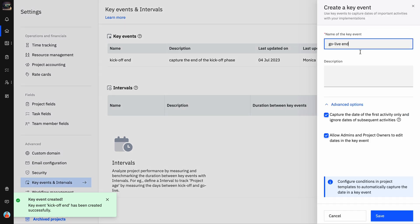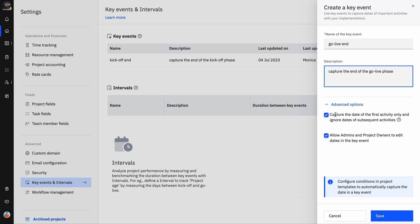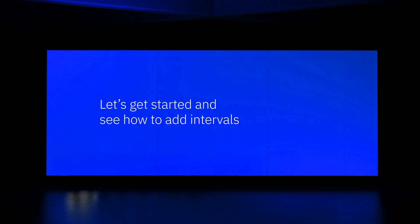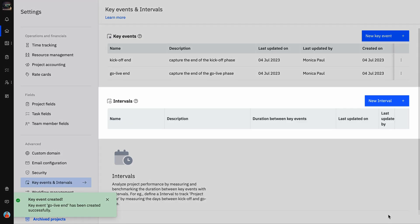You can now add Go Live End as another key event. Next, let's measure the duration between the kickoff and go live end using intervals. This interval will help you measure the time to value of your project. Intervals refer to the number of working days between two key events. You will find Intervals below Key Events — click the New Interval button.